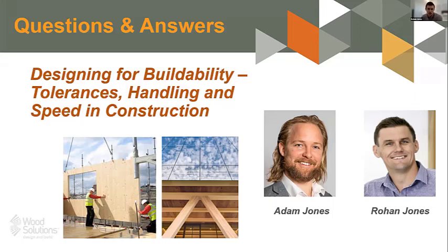We were engaged early on to be able to go through that design process and put our buildability concerns and processes into the actual design. So we can't change a connection if it's not structurally sound, but we might be able to twist or alter a connection detail to make it a successful connection on site. So yeah, it is quite important that you get the installer through that roundtable meeting with the manufacturer, with the structural engineer, and with the builder and also the architect, to make sure everyone gets a good tick.